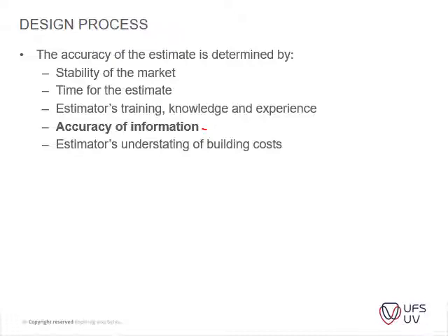So we actually saved a lot of money because the tiling area was such a large area. We could rather put in the PVC expansion joint instead of the stainless steel one, and we still got the same look and feel by just looking at the color of the PVC one that we put in. So that is options that one can actually look at when you do your estimation and so on.